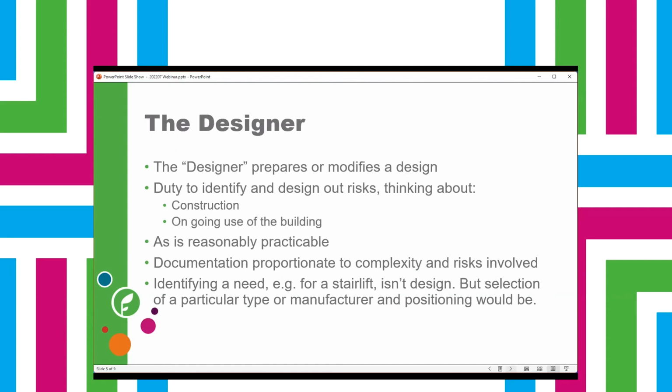The designer is somebody who prepares or modifies a design, and you have to think about designing out the risks, both in terms of construction and in terms of ongoing use, as far as is reasonably practicable, documenting what you do in a proportionate way. And I think the thing for OTs specifically is that identifying a need, for example that somebody needs a stair lift, isn't design. But if you're selecting a particular type or manufacturer and where it would be positioned, then you are doing an element of design, and you would need to think about the health and safety and risks associated with that, and to document those proportionately.